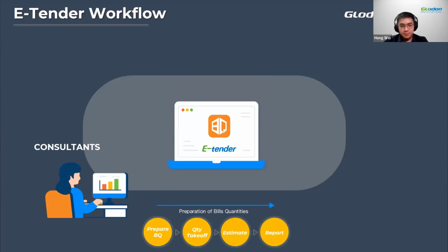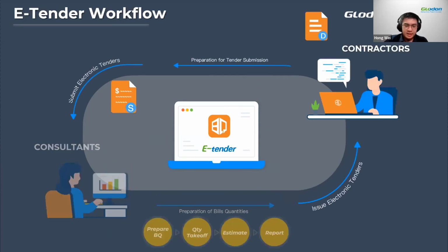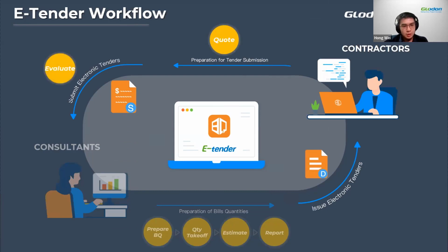So as mentioned, TBQC is a costing platform. So once the quantities taking off pricing of the BQ is done, TBQC is able to generate electronic tender and send it to the tenderers. So the tenderers can actually price in.